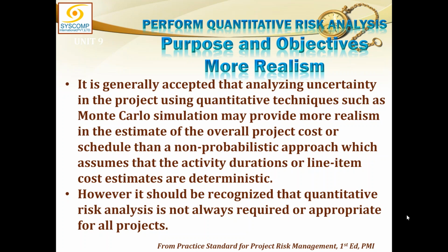Basically, where do we use this 3-point estimate? You use it in estimation, right? Yes, sir, 3-point estimate we are using in estimation. Why are we using it? Because the deterministic estimates we use usually are very dangerous, because I say this job can be done in 3 days, and what if it cannot be done in 3 days? Whole of my estimate will go for a six. So I cannot rely on a deterministic estimate, because that probably is not going to be the reality. In most of the cases, exactly that will not happen.